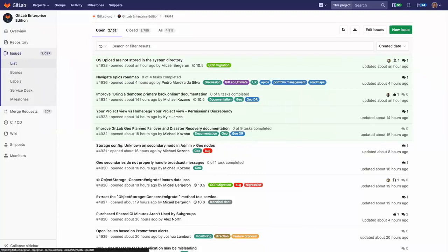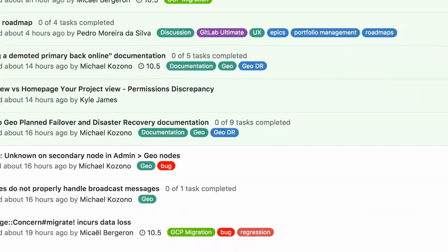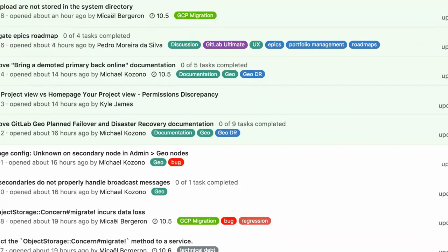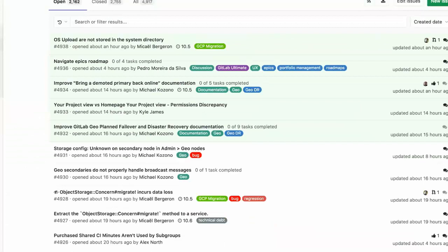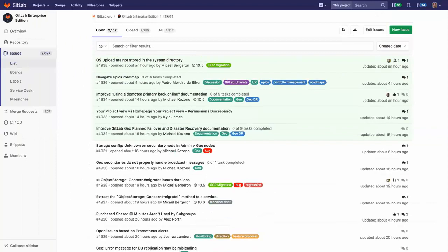The labels that you see across any of these issues help us identify quickly whether these are at a specific stage in part of the delivery workflow, whether these are pertaining to a specific function in the application from a business side, etc. That allows you to be very specific about what we're tracking, how we're tracking it as well. So this is overall our backlog. It is not a backlog without shape. We do use milestones, we do use epics, we do use releases. So we also associate any of these issues to an appropriate context to make sure that we're tracking against that context.